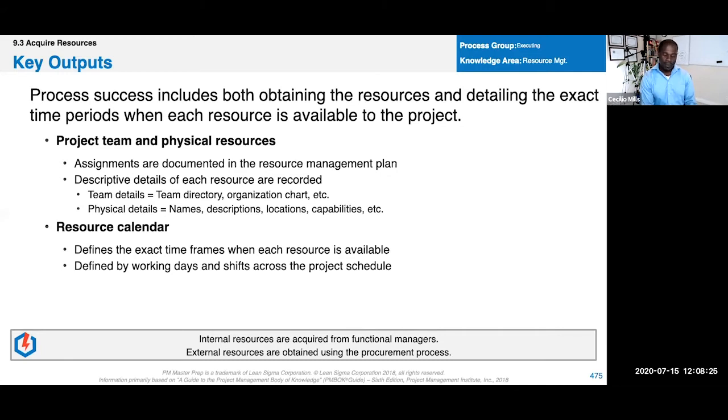And then you'll have some people who are available only on the weekends, maybe 10 to 7. And then you'll have some machines that you can run 24 hours. It doesn't matter what day, but you can only run them 80 hours in a week, all right? So the resource calendars will tell you when a particular resource is available.